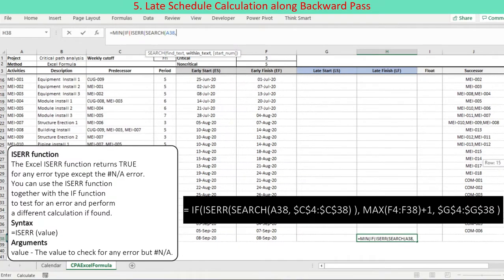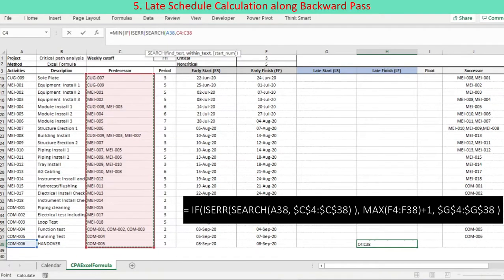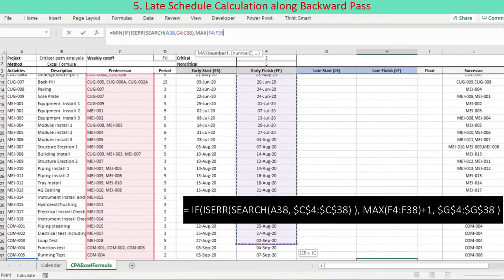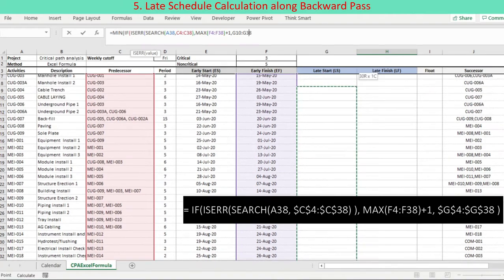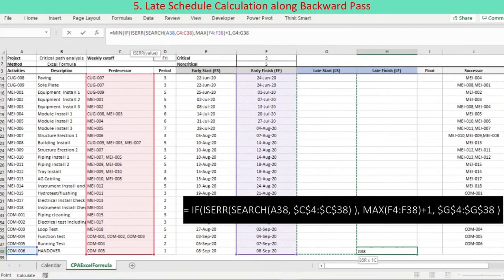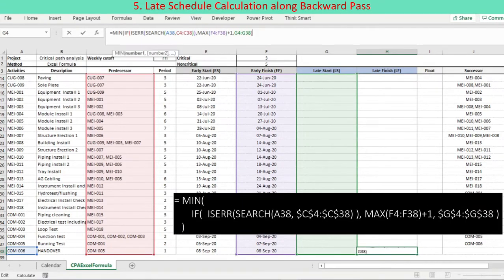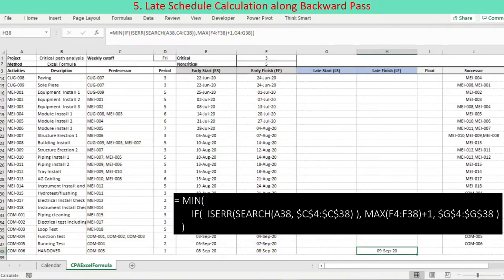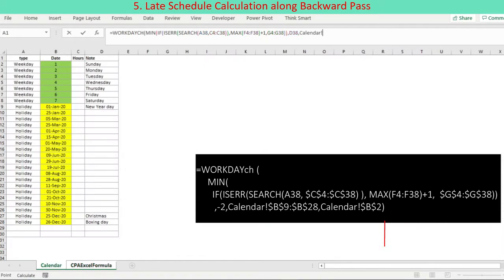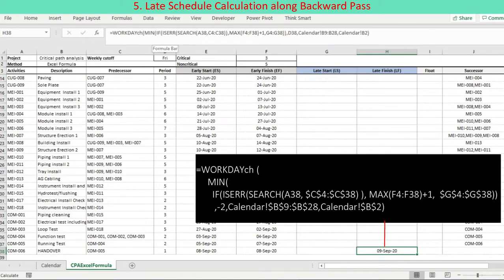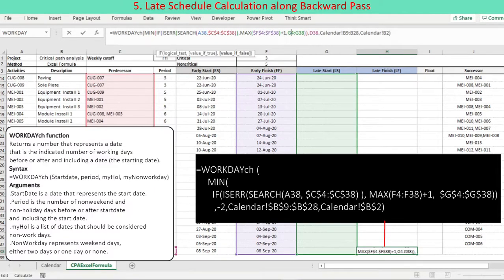The error is captured using the Excel ISERR function. Then the Excel IF function is used to define the value depending on what ISERR returns. If ISERR returns true, the activity's finish date is not governed by a successor and is set to the early finish date of the last activity. The Excel MAX function is used to return the latest finish date of the early schedule. If ISERR returns false, the activity's successor is identified and returns the successor's late start date. Using the Excel MIN function, return the earliest date from late start dates of its successors. The activity finish date should be one working day before the successor's earliest late start date — one day before means minus two days to include the reference date. For this purpose, the custom function WorkdayCh is used, where the argument period is set to minus two.